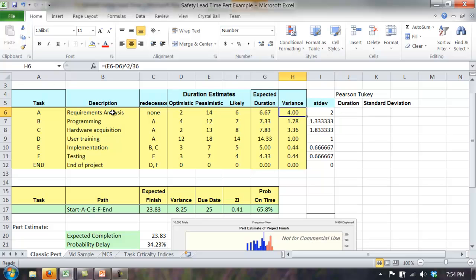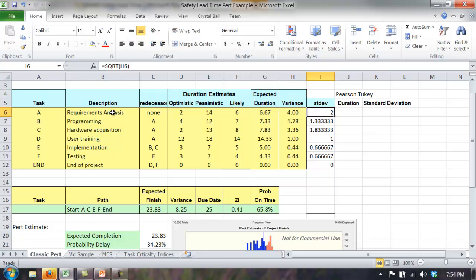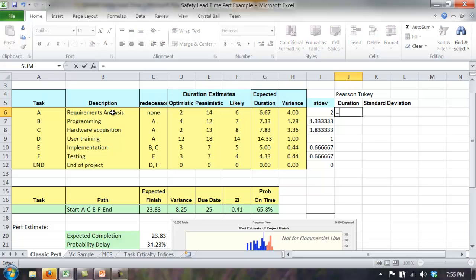I've also modified the formulas. Rather than just the variance according to the classic PERT formula, I've taken the square root to calculate the standard deviation so we can compare standard deviation estimates later. The Pearson-Tuckey formula gives you an estimate of the standard deviation, not the variance. According to Pearson-Tuckey, the duration estimate of the mean should be the median value — we treat their estimated likely value as the median — plus 0.185 times the optimistic value, which we treat as the 5th percentile, plus the pessimistic value, the 95th percentile.